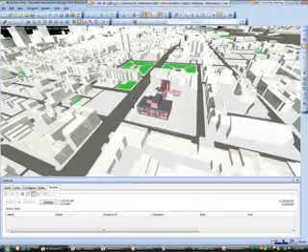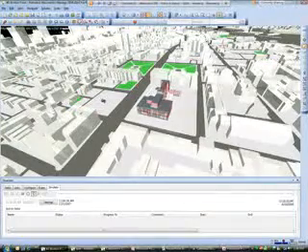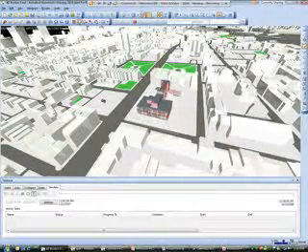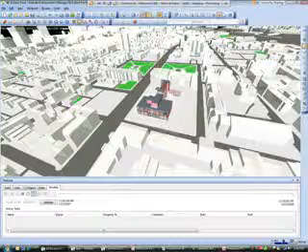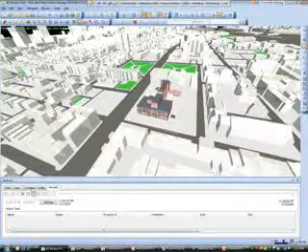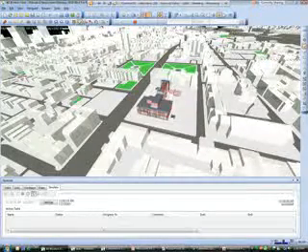Obviously, there are other areas around here, like maybe a vacant lot across the street that could be used as staging areas as well. But this becomes very useful for figuring out what kind of equipment can be placed on site, and on top of that, can we reutilize some of the space going back and forth, having it as a laydown area, then it becomes part of the project and so forth.